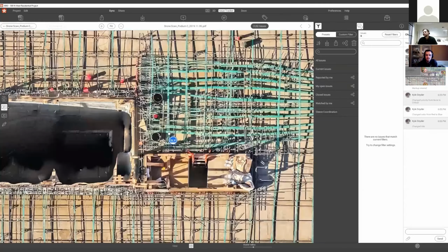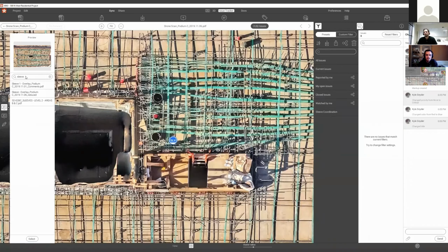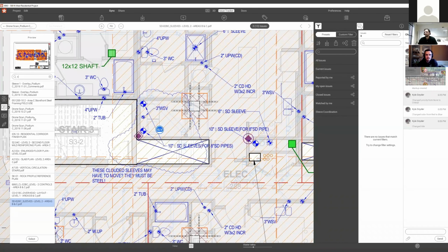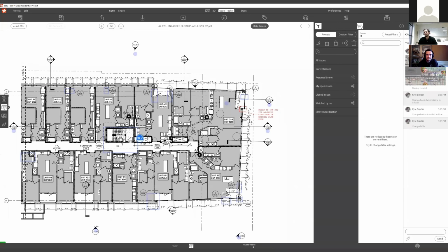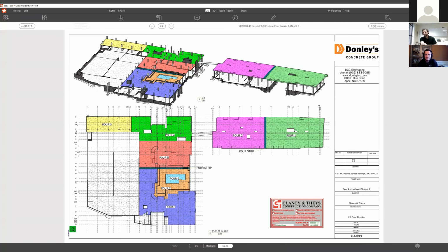So this is something that when we've really started doing it in practice out on the job site, the technology is actually so little of it. It's really, hey, when do I need to be out there to get the capture? You need to let me know when I need to be out there. Then there's different times, different things are installed. So there's so much collaboration amongst the team of just when you're going to go out there. That was the biggest thing I'd say we found so far.